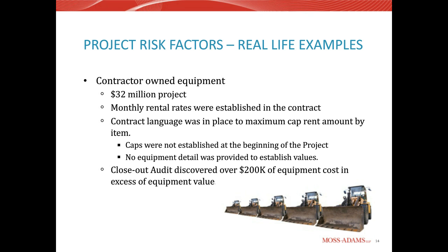So the superintendent was on the project for the first 8 months, and now you've got a new superintendent that's maybe more for a specific trade, and then he brings his new pickup truck. As an owner, should you be paying for that new pickup truck when you've already potentially paid most of one pickup truck off? Things like those are items that you want to establish, and also get enough detail so you can identify those as the project's going.